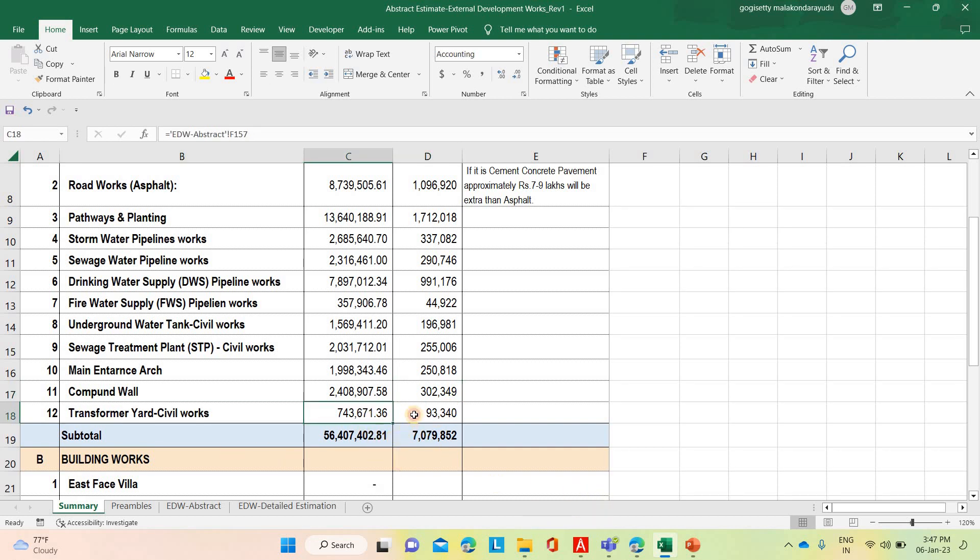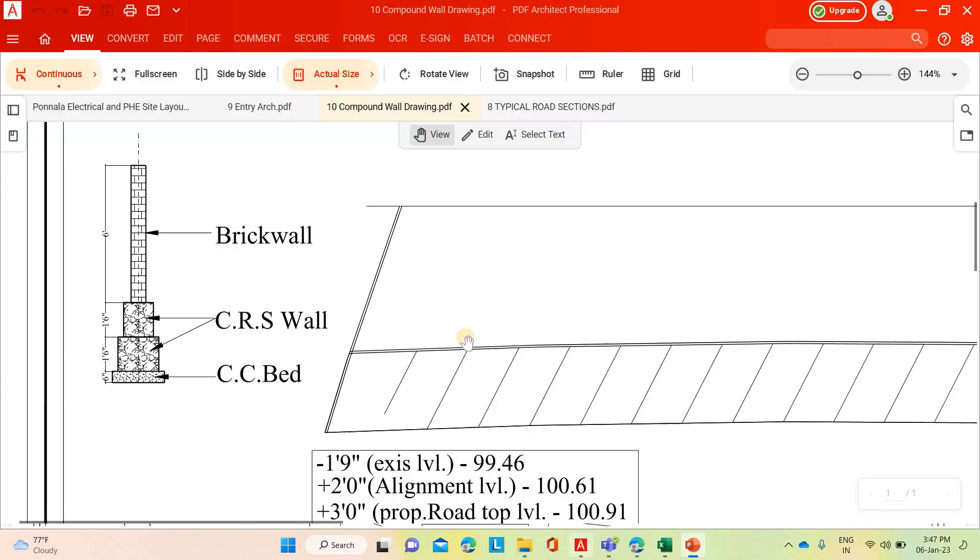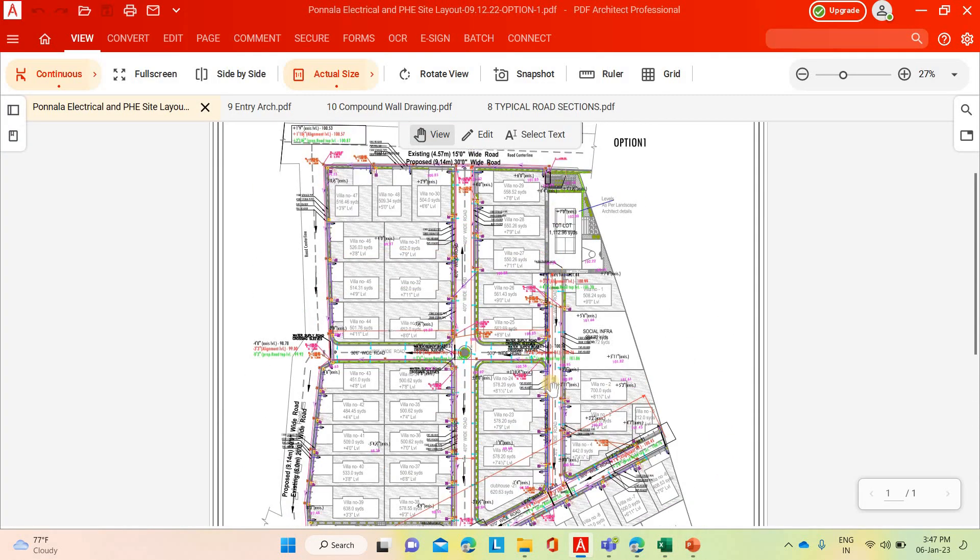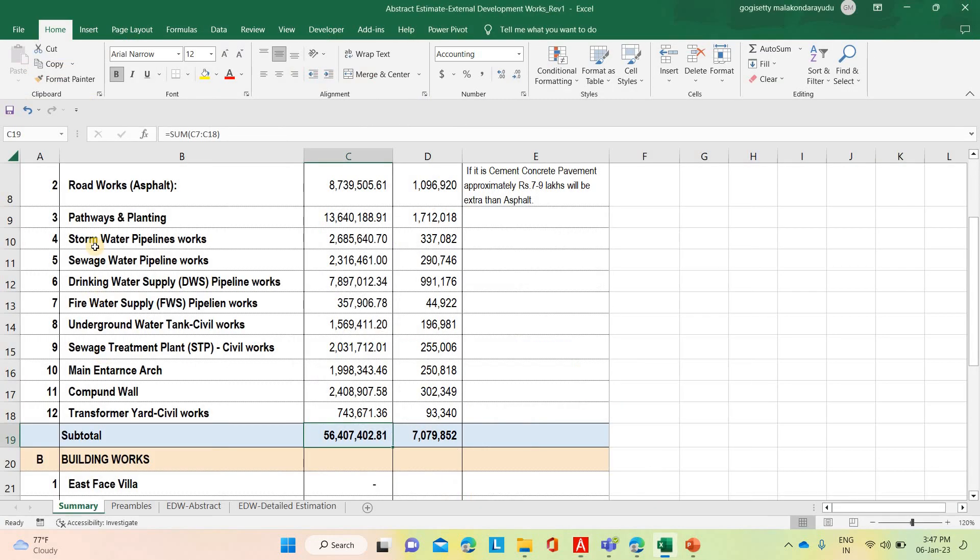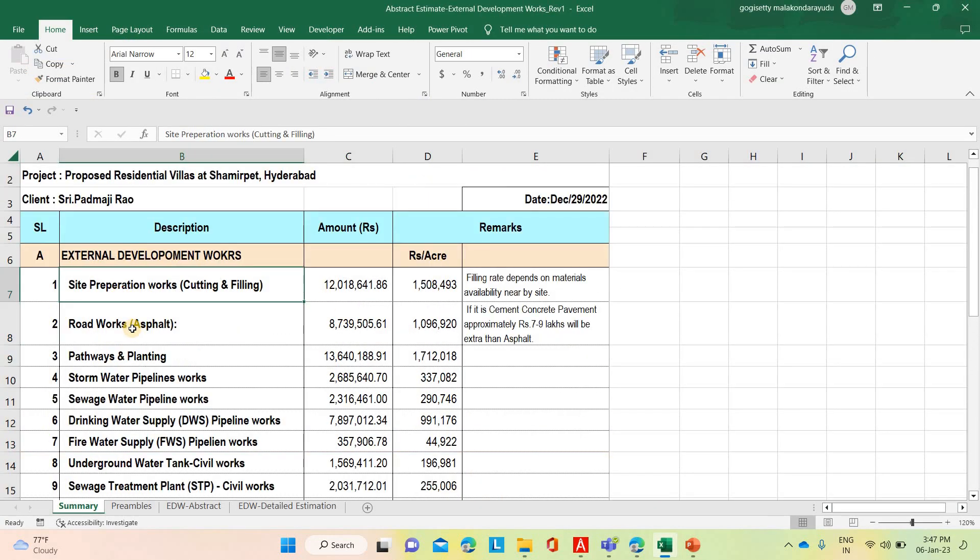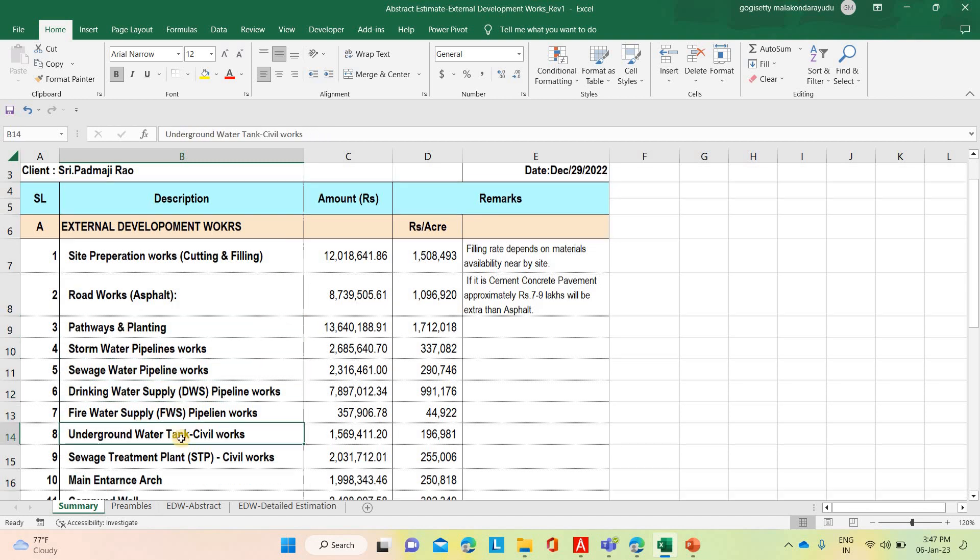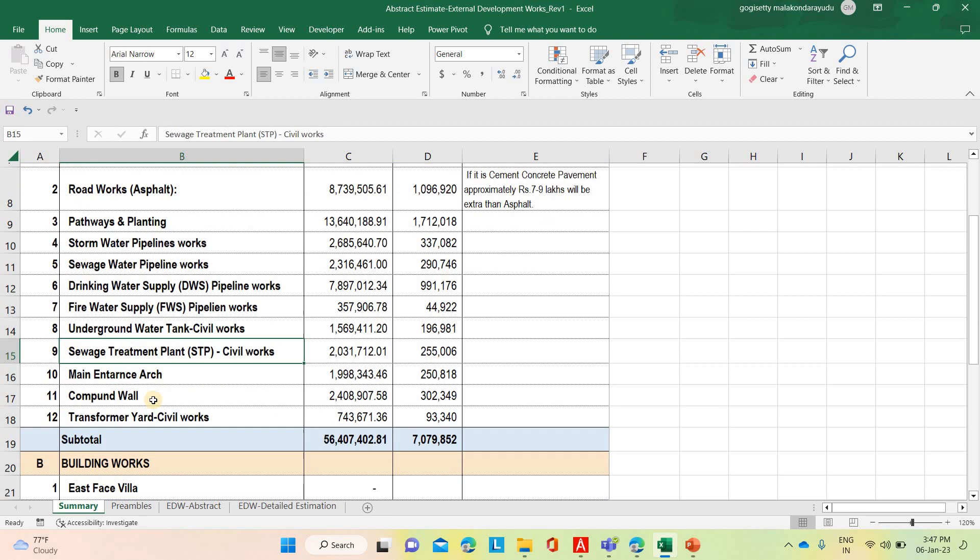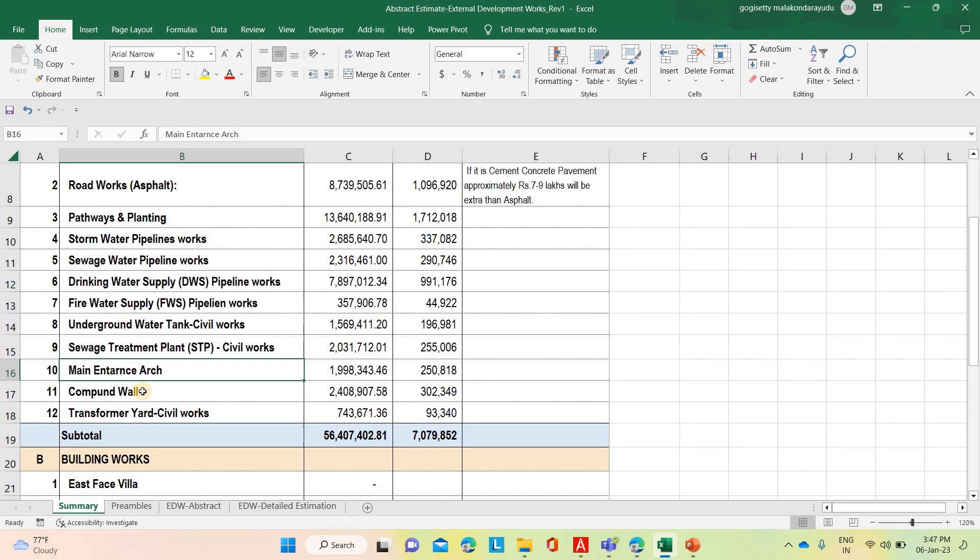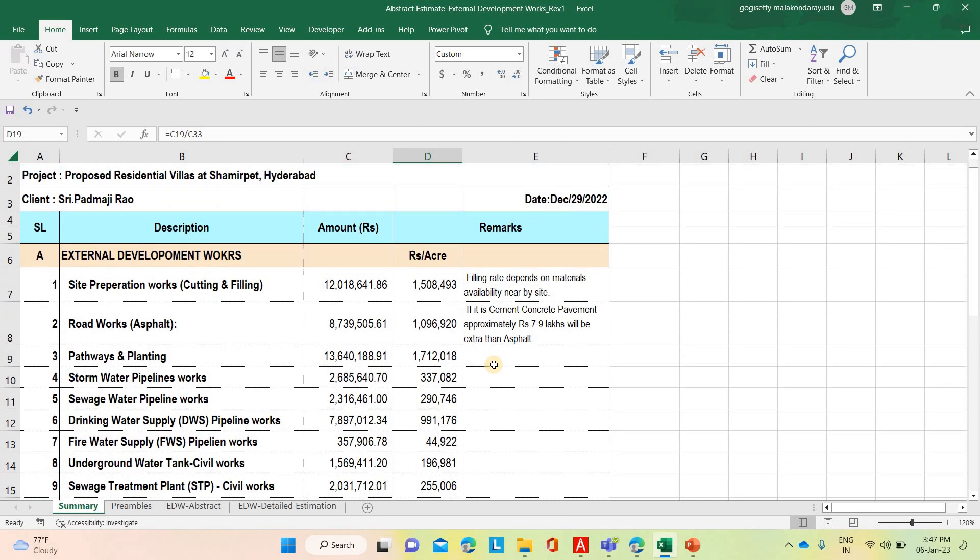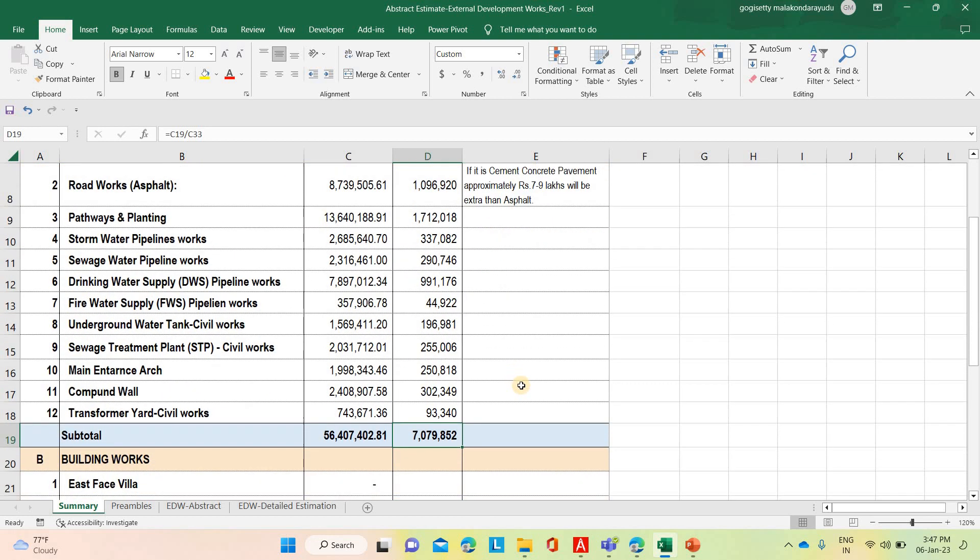Total cost for this, to develop this entire layout, 8 acres layout, considering all these activities - site preparation, roadworks, asphalt road, pathways, plantings, stormwater lines, sewage, drinking water, firewater, underground water tank, sewage treatment plant civil works, main entrance arch, compound wall, transformer - 5 crore 64 lakh 74,002. Per acre it is coming 70 lakh 79,852. Like that, you have arrived at the cost. I hope everybody understood clearly. Thank you very much.